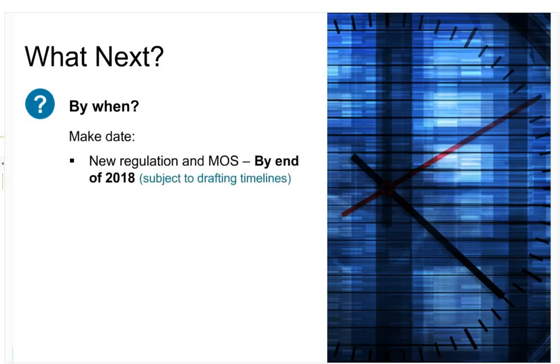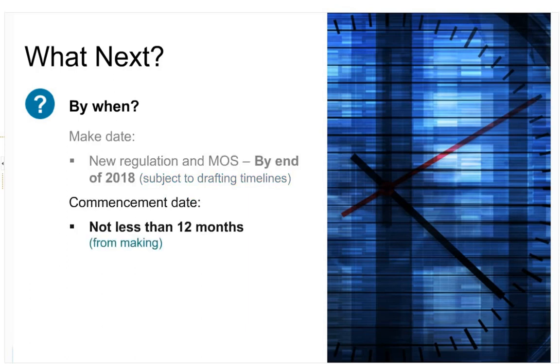Thank you, Darren. So our next key date is what we describe as the make date. That's the date that the regulation will come into law. We have that scheduled for the end of 2018. That's a delay on what's been previously advertised. One of the contributing factors was the depth and detail of the technical feedback. And again, I'm very appreciative for receiving that feedback. We'd rather take the time to get that right and ensure that as much as we can, we make the best quality reg that we possibly can by incorporating as much of that feedback as we can.